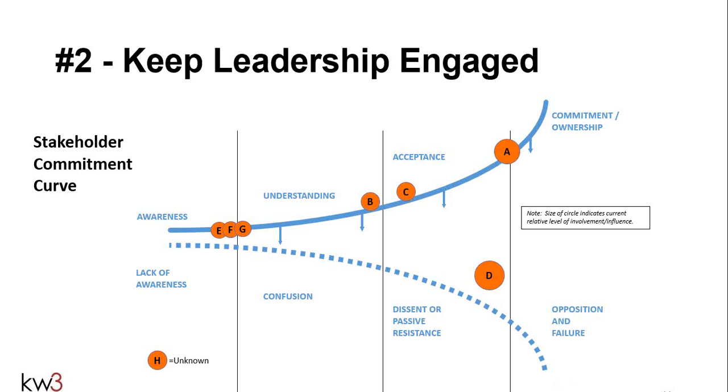So typically what we do is we create 4 or 5 questions. How do they feel about the project? How are they vested in the project? What's important to them? What are their biggest concerns? It's 4, 5 simple questions that give each senior executive a chance to really give their input on where they're at.